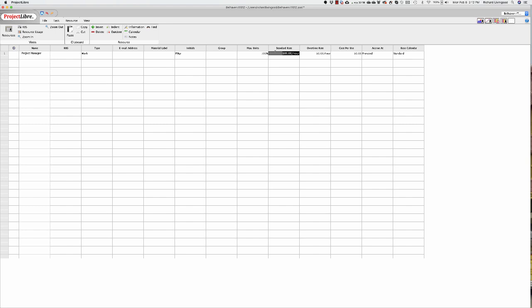If you're familiar at all with burdening rates or with bonuses or with benefits that a person gets, if I pay somebody $60 an hour, it may be costing me $70 or $75 or $80 an hour. So I pay them $60 an hour, but it may cost me $80 an hour to employ them, because not only am I paying them $60 an hour, but I have to pay Social Security, the employer's half of Social Security, and there may be health benefits, and there's vacation and holidays and all that.